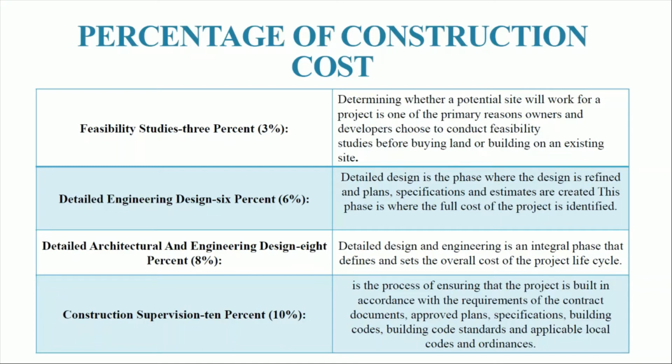Next, we have our construction supervision. This will be given 10% of the construction cost. It is the process of ensuring that the project is built in accordance with the requirements of the contract documents, approved plans, specifications, building code standards, and applicable local codes and ordinances.